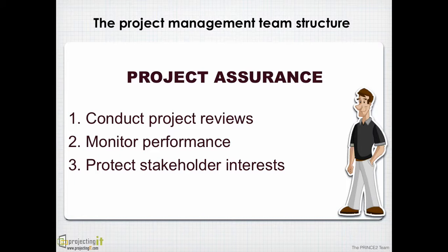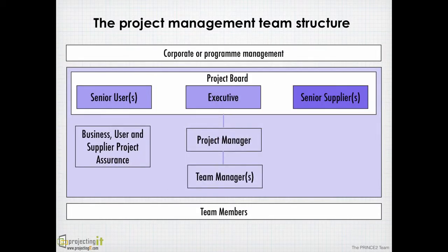Few people call project assurance whistleblowers or watchdogs. These are experts and they look at how the project finances are being managed, how the project solution is evolving, and whether it will address the real problems raised by the users, and ensure that the project standards and quality requirements are being followed. The project manager should never take up the role of project assurance.